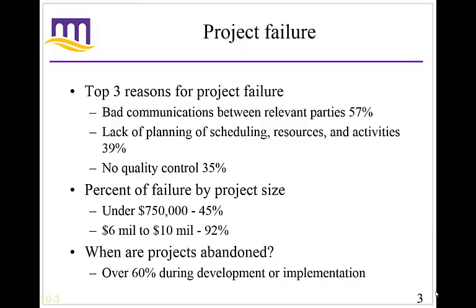But where does this usually fail? Well, the largest projects have the biggest failure rate. It was estimated that on projects from $6 to $10 million, over 92% of them are considered a failure, meaning they took overtime, over budget, or lack of functionality. On smaller projects, it's a little bit easier to handle, but there's still 50% of the time there's a problem, right? So imagine this: you're working in a company, and they say, let's use this new piece of software, but just because someone wants to use this software doesn't mean it's a good idea to do it.